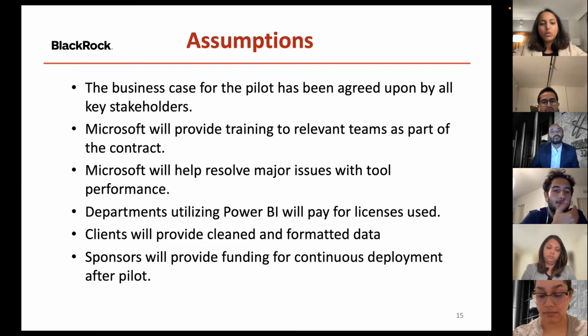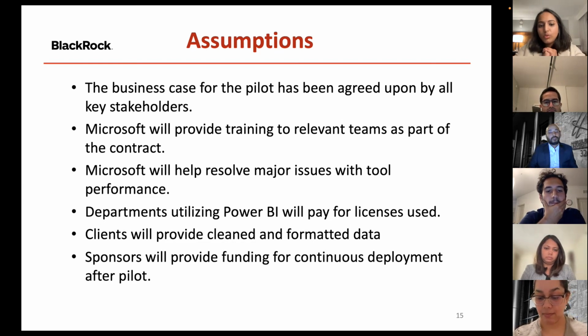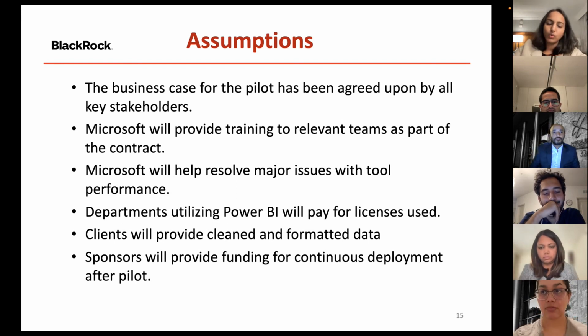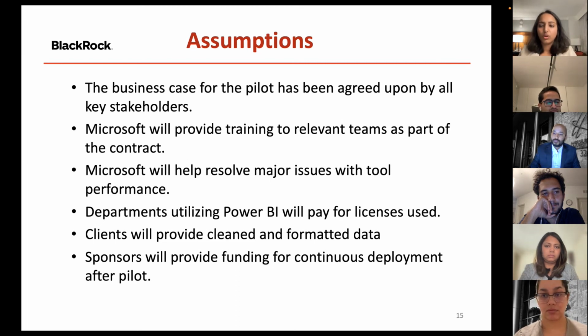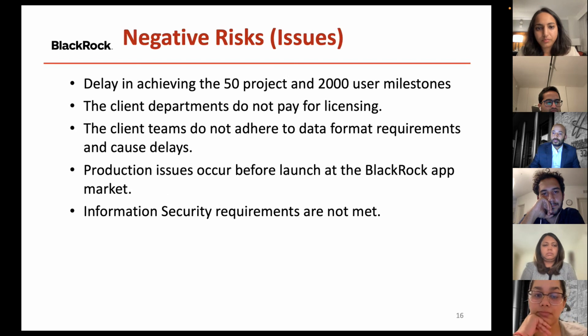The next one is going to be that the clients will also provide clean and formatted data for the project that they want us to work on. So we will receive clean and formatted data. We will not be working with the clients to work on that because that is going to create some delays. The last but not the least was going to be that the sponsors will be providing the funding for this project going ahead because we will need that for continuous development after we end this pilot. We can move to the next slide.